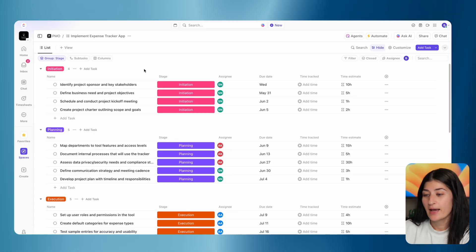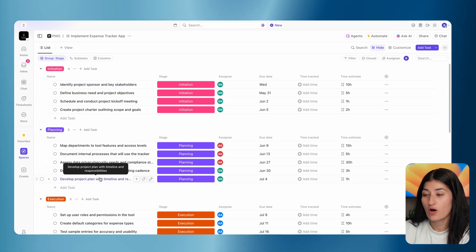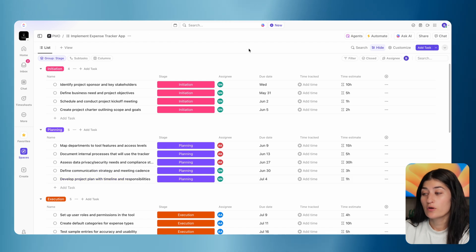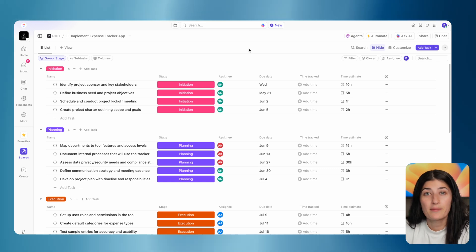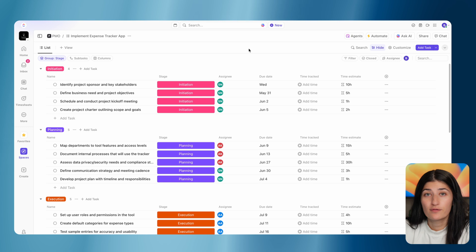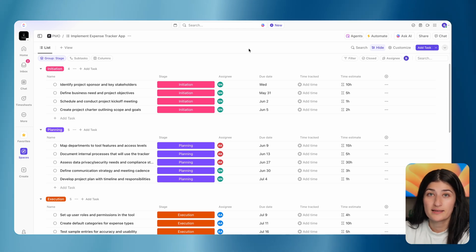We're back. I went ahead and completed my entry of all my tasks. These are all of the tasks for my project. The three most important fields to make sure that you fill for any project plan are the assignee, the time estimate, and the due dates. These are very important fields so that you have a nice Gantt view, and you can also do some workload capacity management. If you want to know how to make use of the workload view in ClickUp, check out this video right over here.